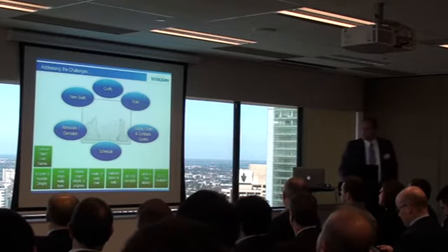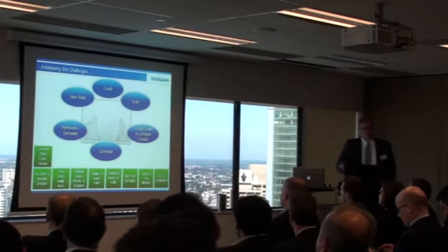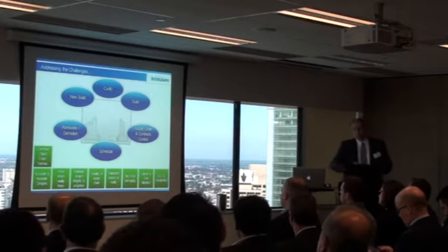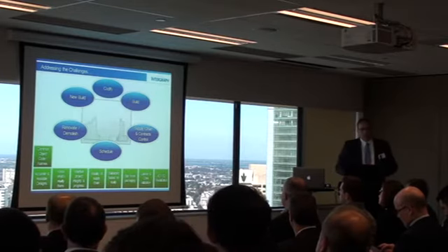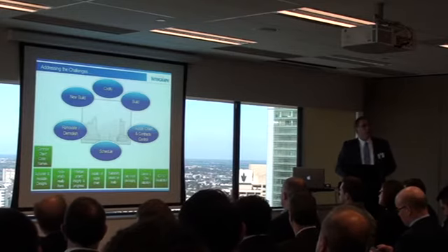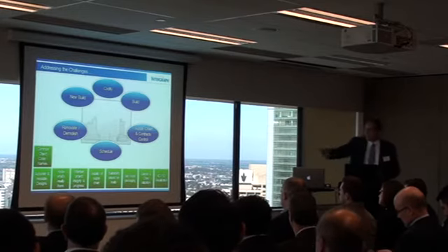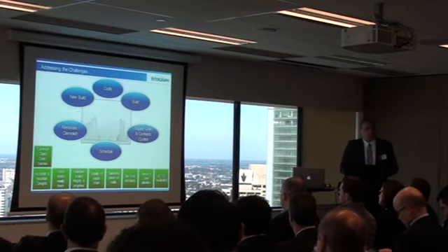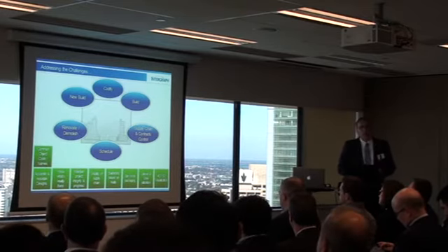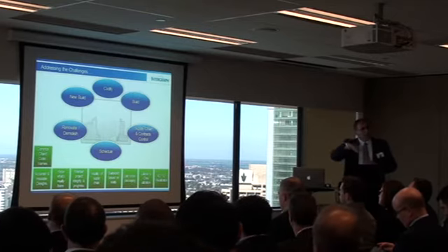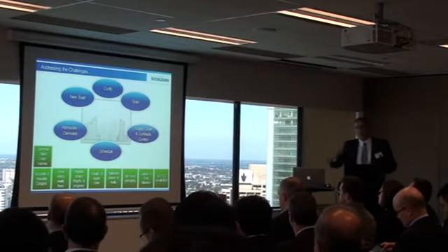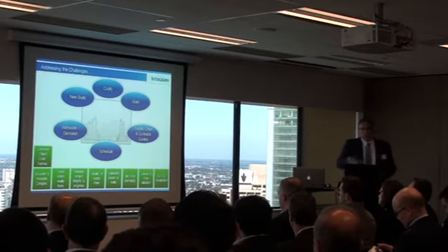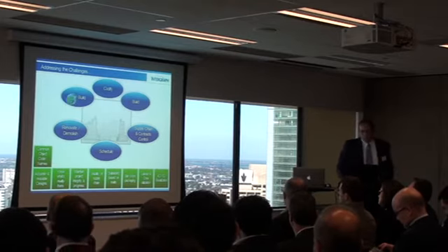Then obviously with building construction, this is mainly managing the labor. So supply chain manages the physical materials, but also the labor, the crews, so they are optimized. As you see, the optimization of crews, when they are coming in or not coming in. And then perhaps see the 4D, 5D simulation. Okay, we start here level 1, level 2, level 3. Oh, I can't start level 2 because the structural beams have not arrived yet. Whatever it is. In all this picture, there are whole dependencies.